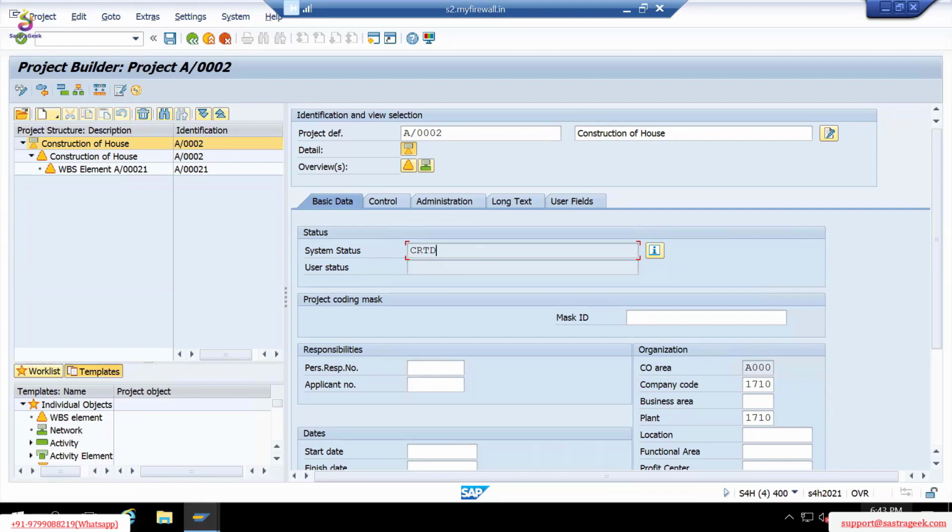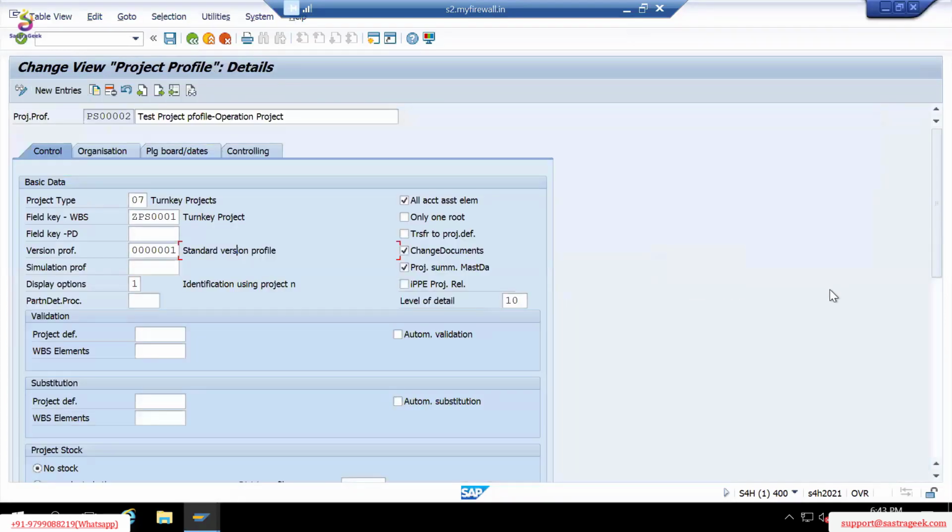So at this particular instant, whatever master data, including plan, cost, budget, including master data of the project, dates, parameters of the organization like plant, profit center, storage location, etc., all those information will be stored by creating version. The purpose of creating version is to compare the data in between two versions. So what value has been changed, what was the old value, what was the new value, that we can easily compare by accessing the standard reports.